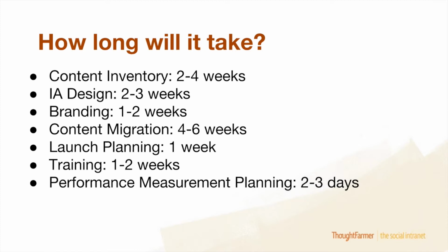It depends on the size of your company as well. But if I had to put a number on it, I'm not super comfortable putting a number on it, but I would say anywhere between 1,000 to 1,500 pages of content is likely going to take 4 to 6 weeks. Remember, you're not only copy pasting, but making sure that content is migrated into the right spot, it takes the right format, it's set up with the right metadata and all of those kind of things.